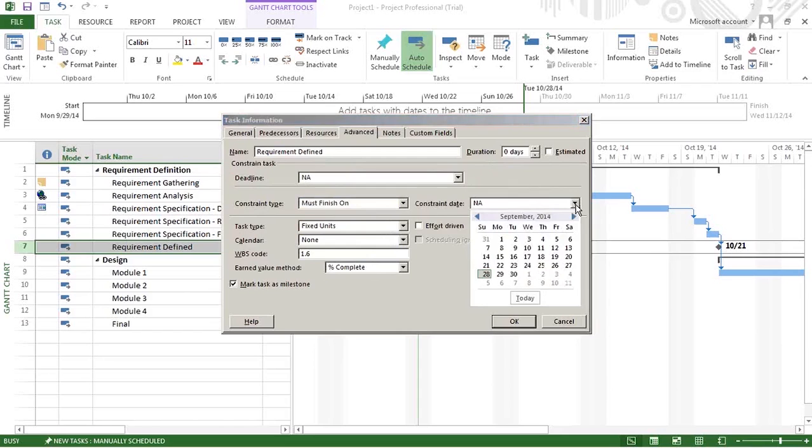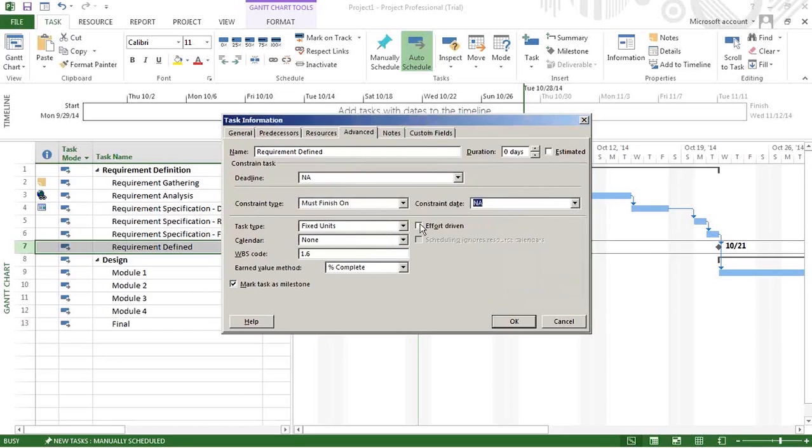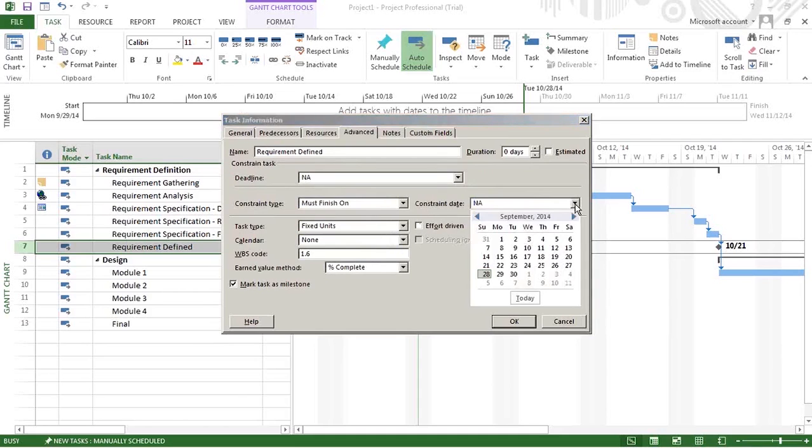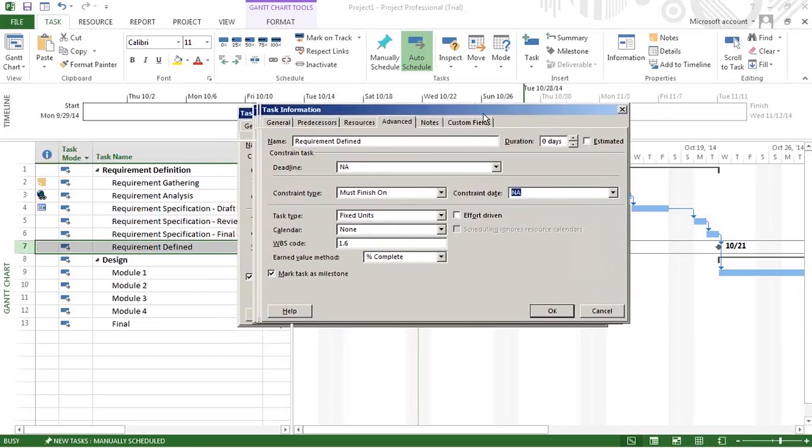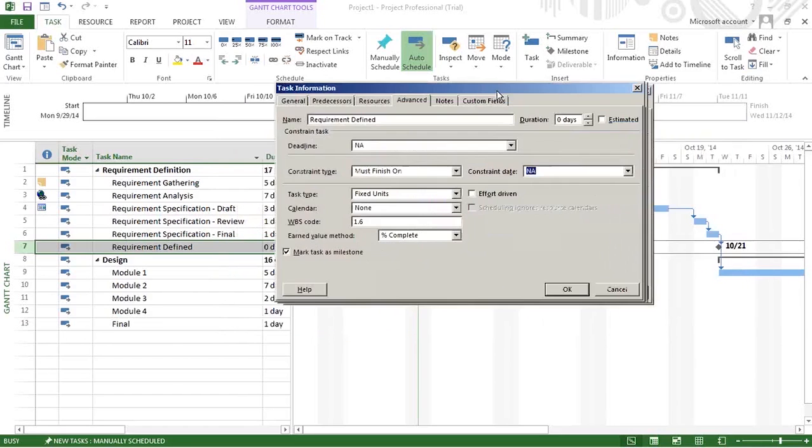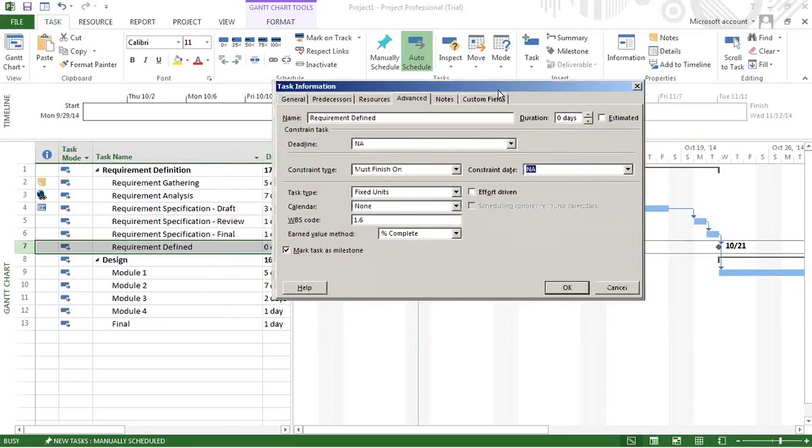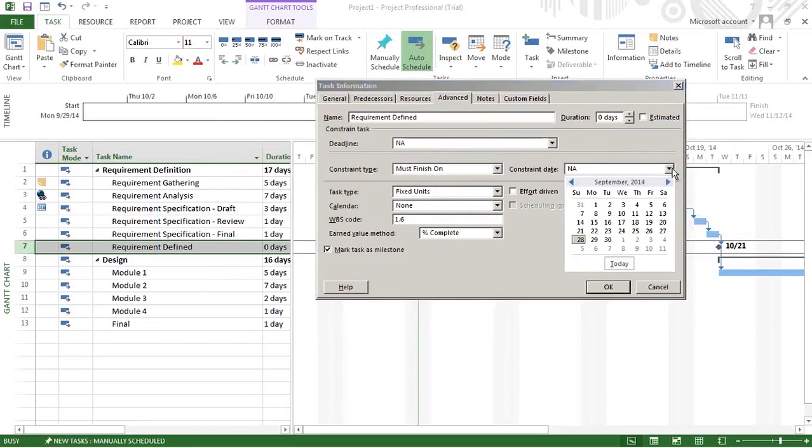Since Requirements Defined takes, in total, 17 days, the constraint type could be October 31st.